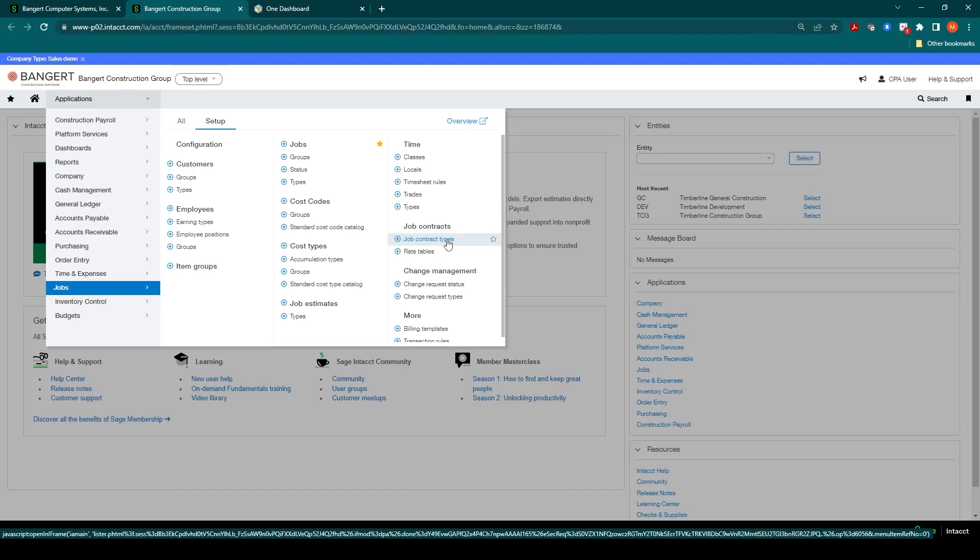For time and material contracts, you will be able to create rate tables and apply them to the individual contracts as needed. These markups and rates can be based on various items like inventory items, standard cost codes, or cost types. You can also apply separate start and end dates to these tables to reflect price increases as needed.